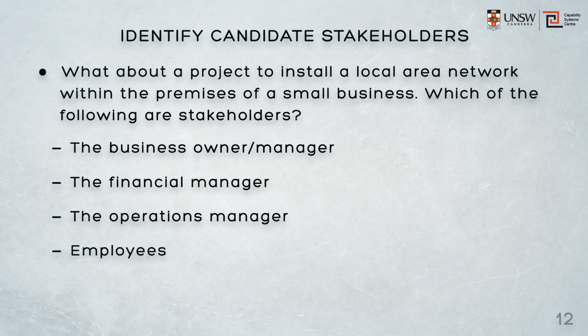Employees, well, they're undoubtedly affected by the system, but they're also not naturally stakeholders unless they're given the right to dictate some requirements, for example, perhaps the location of some of the peripherals. The building manager, well, the building manager has to be consulted, but subsequent requirements are constraints. The manager does not own the business nor take any part in it, and so they're not a stakeholder.